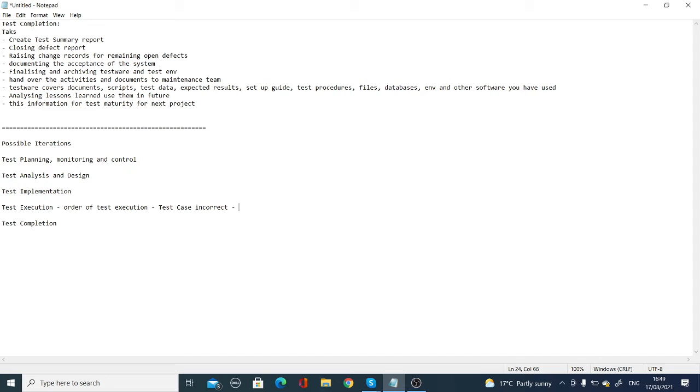During your test execution, you may find the planning is incorrect. You need to change the entry criteria and exit criteria. During execution, if many people are executing, one person is doing much work and another is lagging behind, then you need to go to the planning phase and replan the test execution activity or any activities you are doing in the current phase. Any question? No.